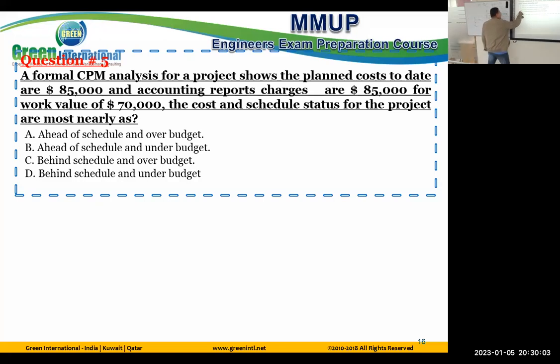What is our budget here? This is what is coming in our exam, this question. SPI is giving you directly 1.01, CPI is 0.97. What is the project status? Here, exactly, SPI is equal to 1.01 and CPI is equal to 0.79. Cost wise, over budget. Schedule wise, ahead.